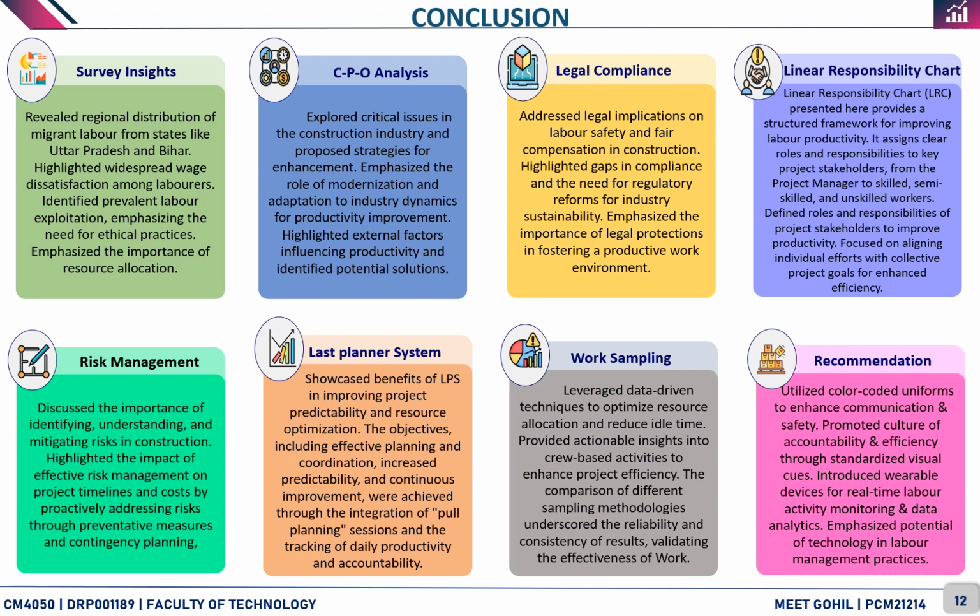Work sampling leveraged a data-driven technique to optimize resource allocation and reduce idle time, and provided actionable insight into crew-based activity to enhance project efficiency. Visual management for construction site efficiency utilized color-coded uniforms and signage to enhance communication and safety and improve productivity. Indirectly, it promoted a culture of accountability and efficiency through standardized visual cues.